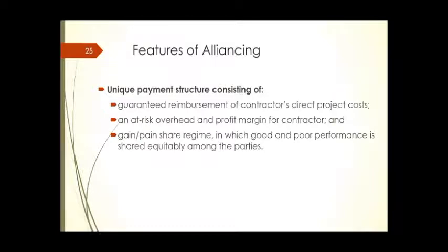Okay, so this is the gain and pain share regime. If the total cost is less, then they will share the gain. If there's more, the only thing that will be shared is the overheads and the profit of these people. Okay, so this is what you need to know about. So is it really true that alliancing is not going to give the client better value for money? It has been advertised so many times that alliancing is the best for the clients.